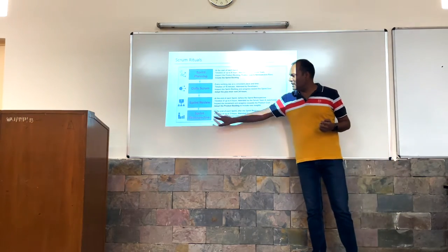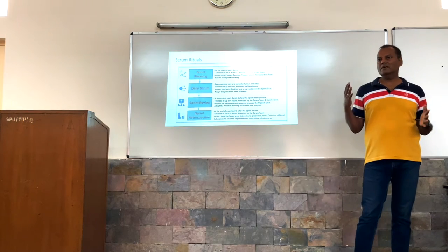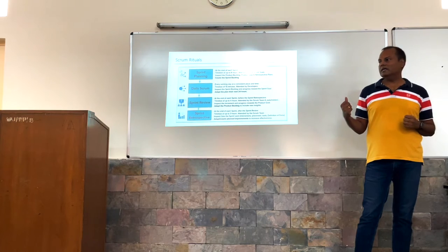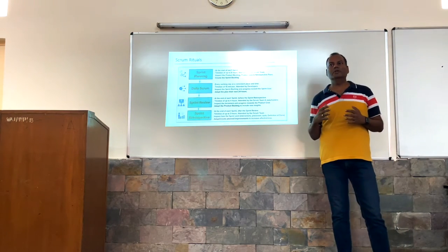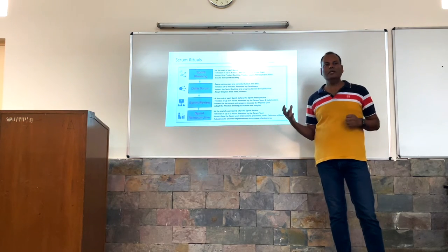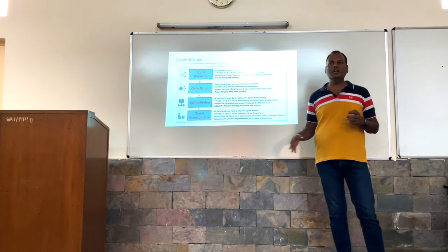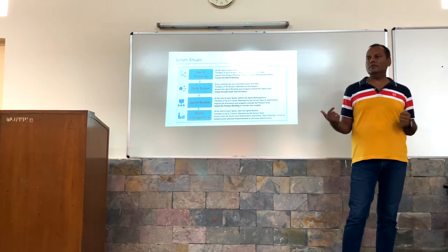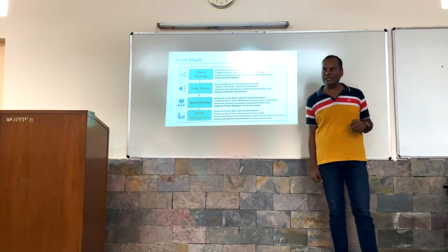And the last meeting is what we call the sprint retrospective. In the retrospective, they see what good work they did in the past sprint, and what bad things happened in this sprint. So in future they may continue the good parts, and they can reduce those bad things that happened in the sprint. So this is retrospective, it's not a blame game for anyone. It's collective, as a team, what they did good and what they did wrong. So these are the core rituals we usually follow in Scrum.